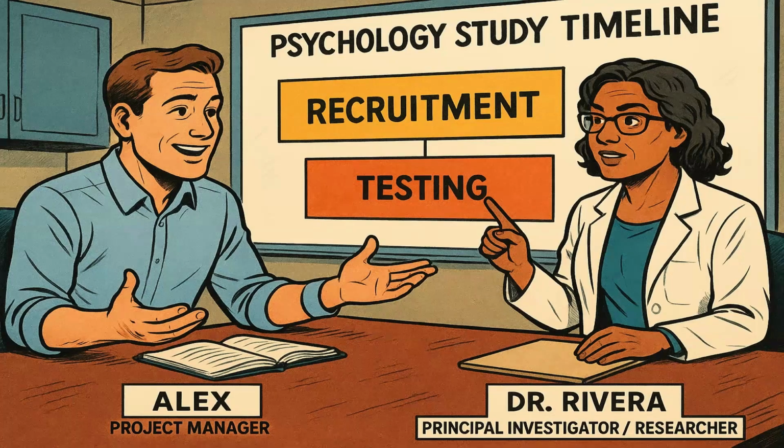Alex isn't just coming up with numbers willy-nilly. He's actually going to prior projects that either he managed or maybe colleagues of his managed that had similar types of recruitment requirements, similar types of testing lengths, similar types of equipment that was used, similar types of universities. So you try to collect a sample of different studies that have already occurred, and then he's going to base his estimate on that sample of previous studies.